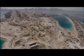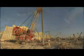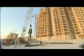I think this is based on a misunderstanding of our ground improvement process and the vibro-compaction techniques that we use. Through vibro-compaction, there is actually a lowering of the ground surface. This is very calculated. We add further sediment, we raise the ground level, we undertake further compaction, and we continue this process until we get the final design grade. In fact, the strength of the ground on Palm Jumeirah, following the ground improvement process, is actually stronger than the ground on the mainland of Dubai.